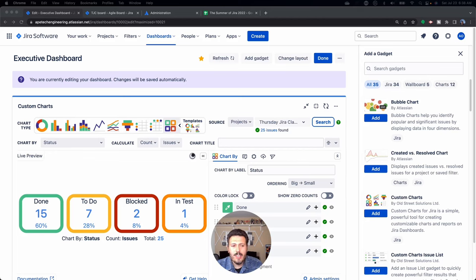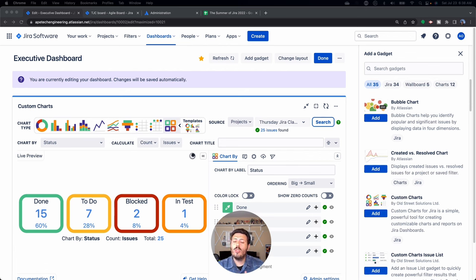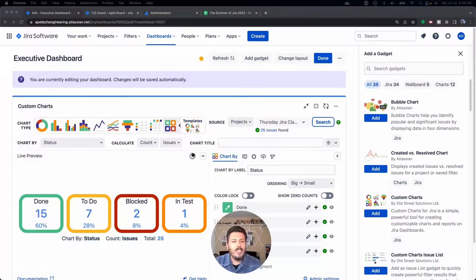The next chart is not necessarily a breakdown of all statuses, but I'm very interested in seeing all my blocked issues. As a Scrum Master, you're continuously hearing during daily scrums: what did I do yesterday, what am I working on today, and any impediments — which usually mean blocked. This particular project has a status of blocked, and I just want to show all issues in that blocked status. If I can visualize those impediments, I can strategically go in and from a tactical perspective take action to remove those impediments from my team. We're going to select the tile chart type and go to the project that has these blocked issues. If you don't have a block status, maybe you have a block priority — this will work with either.